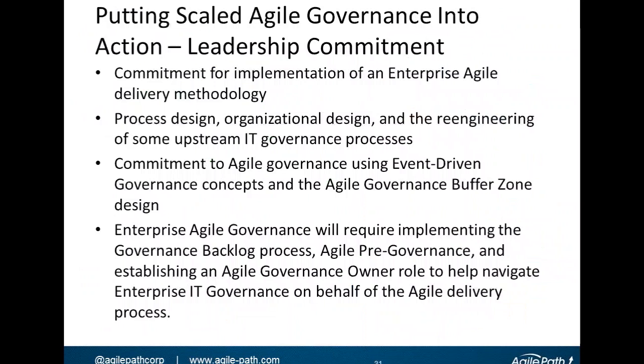Backlog grooming happening also surfaces governance action requests. They need to be addressed a little quicker, but again, we're talking weeks outside of the 2 to 4 week sprint cycle. And then, of course, at the sprint level, with self-governance being in place, I'm showing these as red arrows because we understand that when the sprint identifies an emergent governance requirement that hasn't already been pre-governed in this flow, it's dealt with through those red arrows, which basically means it's a near real-time response.